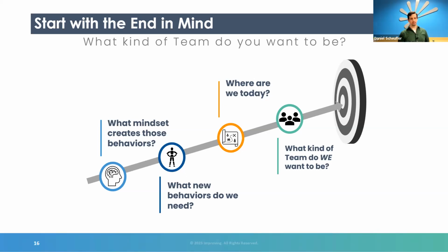We need them, not the individual. And so the individual's behaviors are changed to orient towards a group's goal. In orienting them to a group's goal, each individual on the team may change in a different way. If we are having, for example, a challenge of throughput with the team, we cannot get tickets consistently flowing, they get stuck in a status. We might look at that status and realize that we need to shift the balance of work and put some more back on the developers and have the QA stand up at a higher level when they're doing their work. Or we might go the other way and say, developers, y'all are going too deep into the weeds, stop looking for edge cases and let the specialist QA go find them and tell you about them.